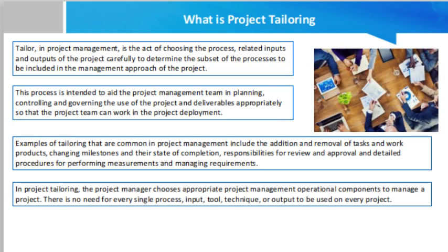The benefits of a tailored approach to your project management methodology are buy in from team members, customer oriented focus, focus on the best approach for the project, and more efficient use of project resources. The steps to develop a tailored project methodology are: identify types of projects, identify inputs, identify constraints, identify resources, develop and document the methodology, drive output, conduct continuous improvement, monitor key performance indicators, and repeat for each of the different projects.